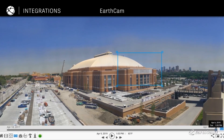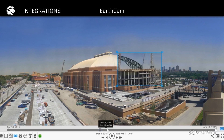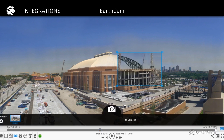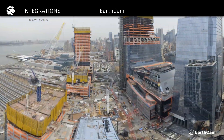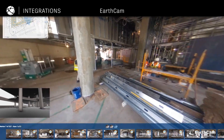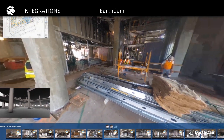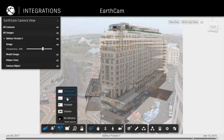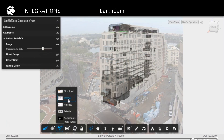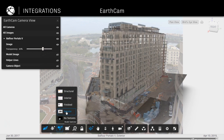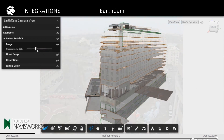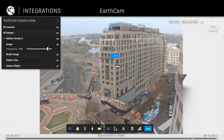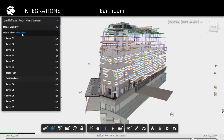Add the EarthCam partner card to your dashboard to monitor job progress with 4K videos, time-lapse photography, panoramas and more. Highlight key visual data from EarthCam construction cameras during decision-making. Our integration enables you to superimpose images and videos over your 3D models. Drill down into layers and save various views to share with project stakeholders.